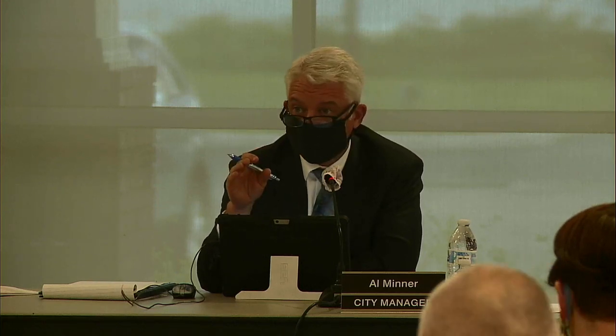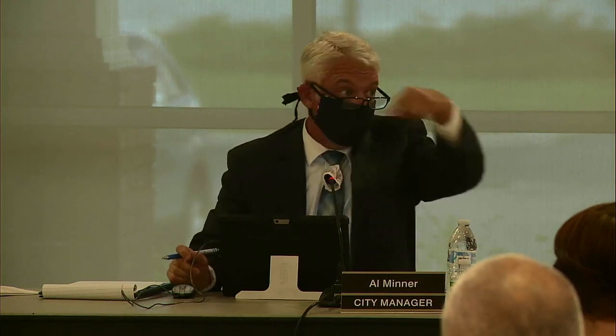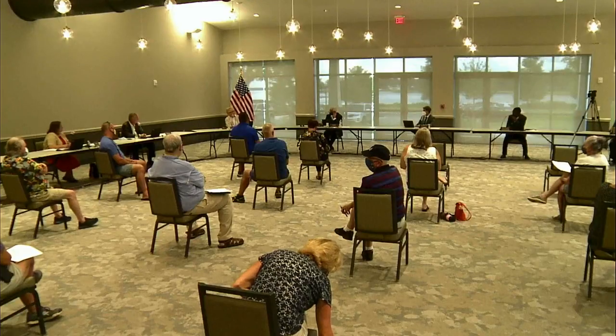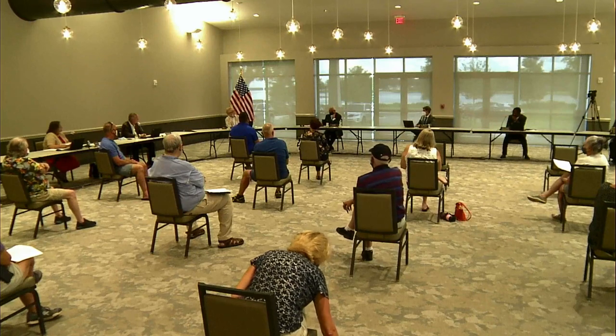So what this contract does is it brings in a new contractor. We address some design items, and upon your approval, we'll get back to work wrapping up the second and third floor. If you opt not to do this and just scrap it, you'll throw about 70 grand back in the hopper, and you'll have first floor done and second and third floor not done. Is there any way to recoup some of the overages from the first contractor in penalties?